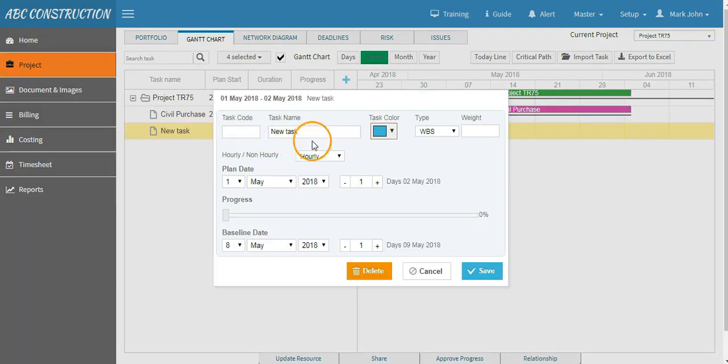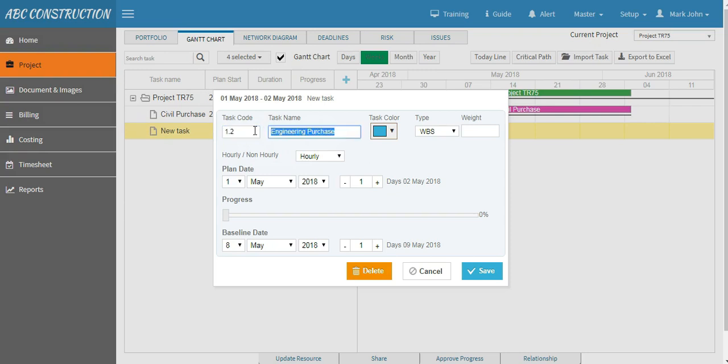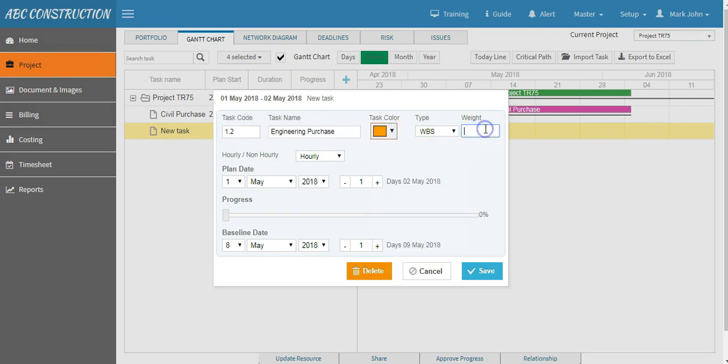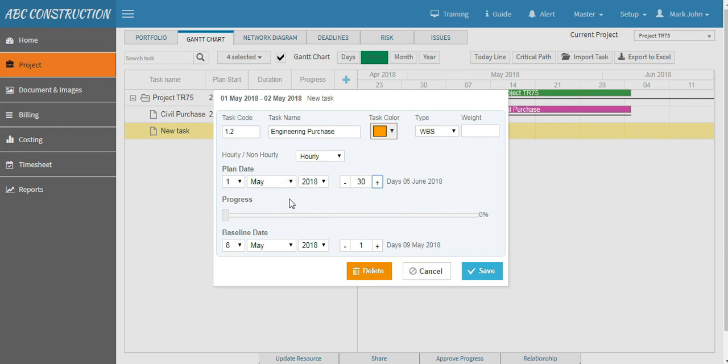Say the task name is Engineering Purchase. Give the task code, specify the task color, leave the weight and say this task will also run for 30 days as well. Now you can plan to start both of your tasks at the same time under L0 or may specify a particular date on which you want to start your second task.